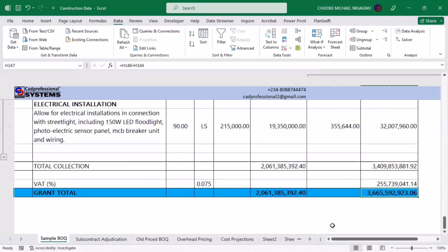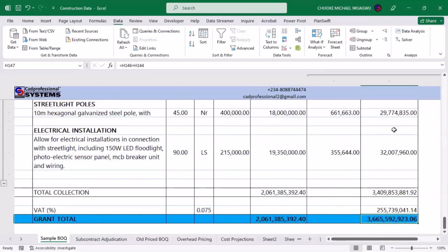Whereas the price of the work is the cost of the work to the clients. Your price includes all the add-ons that you have already included: your markup, your profit, your labor, all those considerations, your contractors, preliminaries, and the rest of them. They are all considered as part of your pricing. Whereas the actual things that go into doing the work itself alone are only considered as part of your costing.